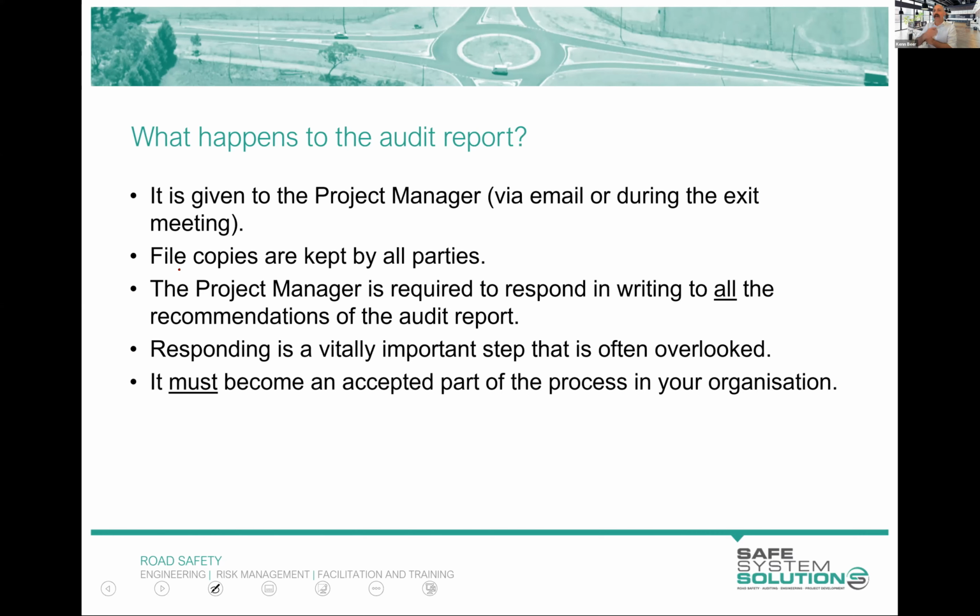Different legal friends or colleagues often talk about this one as the smoking gun if there's an incident. If there's an audit report and it's got no responses to it, the road authority said we had to do a road safety audit, we've done the audit, they get it, they put it in the file, they never responded to the report, said what they were going to do or not do, and it's just sitting there.